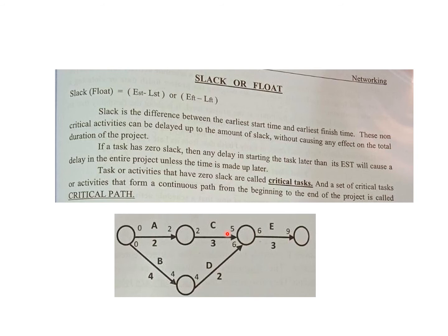Critical path. Every project will have at least one critical path, right? The project completion time is the sum of the task times for the tasks on the critical path. That is the project completion time, because that is the path along which any delay is not an acceptable delay. Before that, all the other tasks are finished. So the critical path takes the longest time. Project completion time is the sum of activities in the critical path.